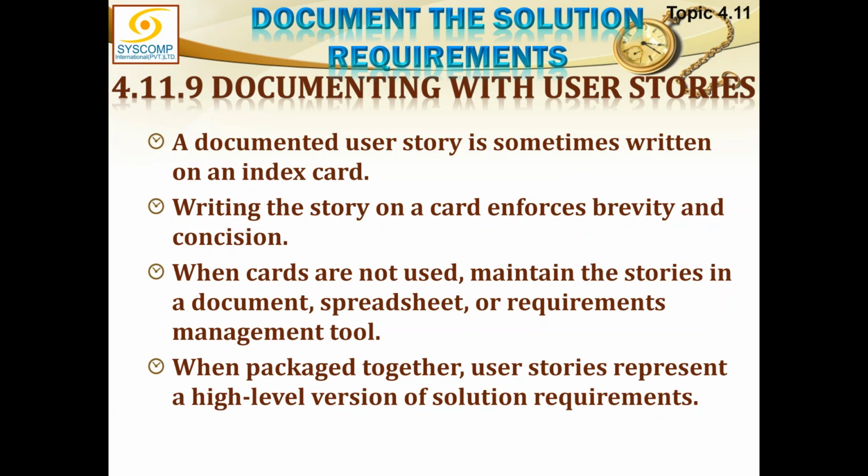A documented user story is sometimes written on an index card. Writing the story on a card enforces brevity and conclusion. When cards are not used, maintain the stories in a document, spreadsheet, or requirement management tool. When packaged together, user stories represent a high-level version of the system requirements.